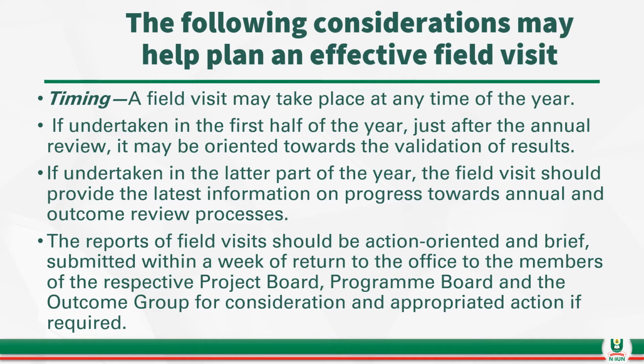And what are the factors that can help you? One, timing. A field visit may take place at any time of the year. If undertaken in the first half of the year, just after the annual review, it may be oriented toward the validation of the result. Depending on the program or project you are carrying out, it can be done at any time of the year.